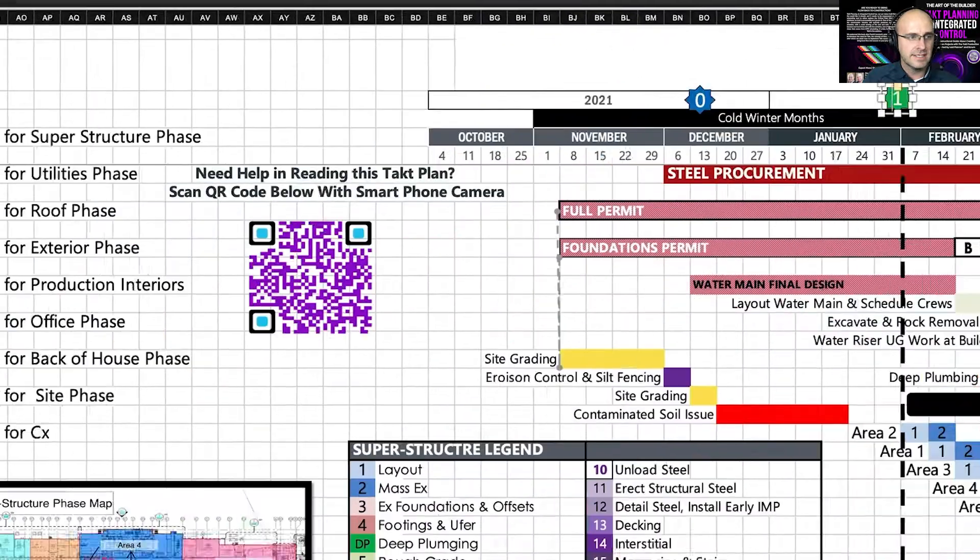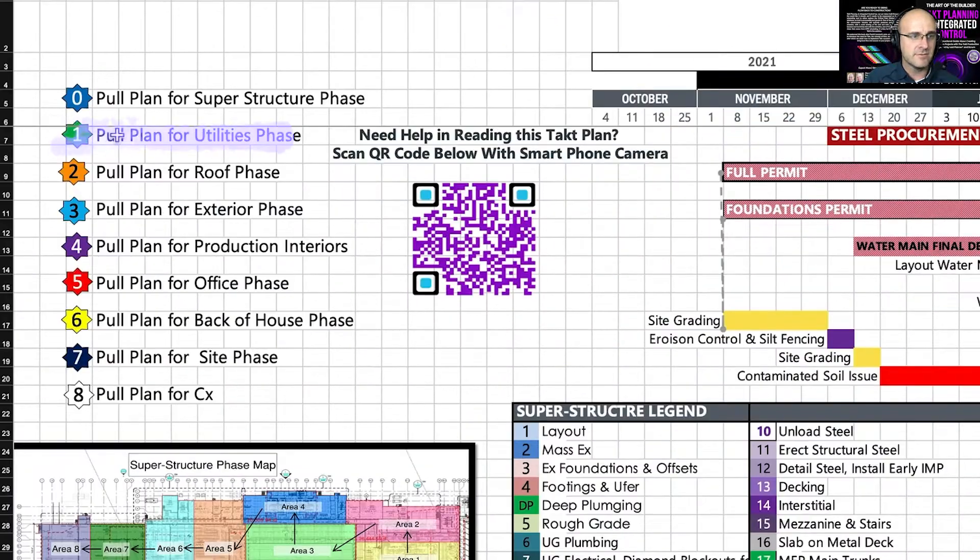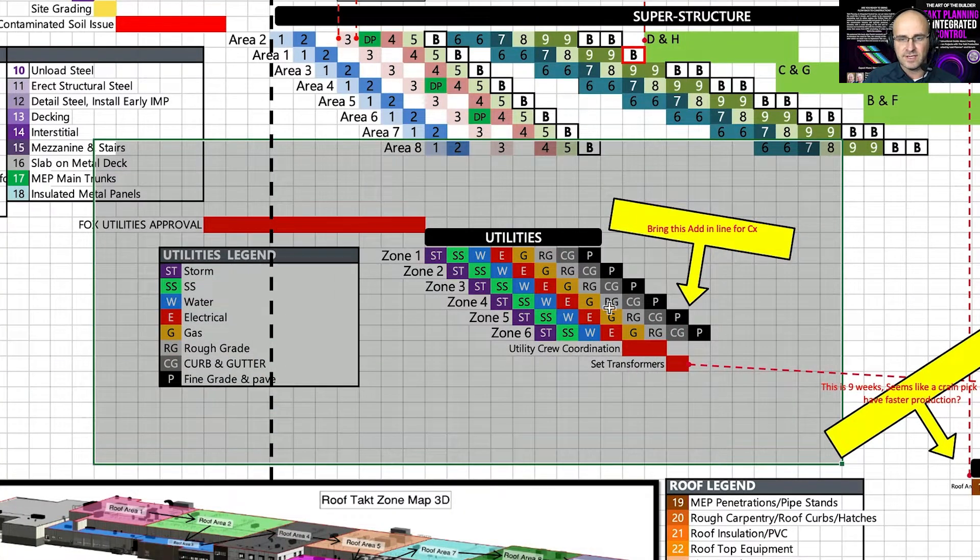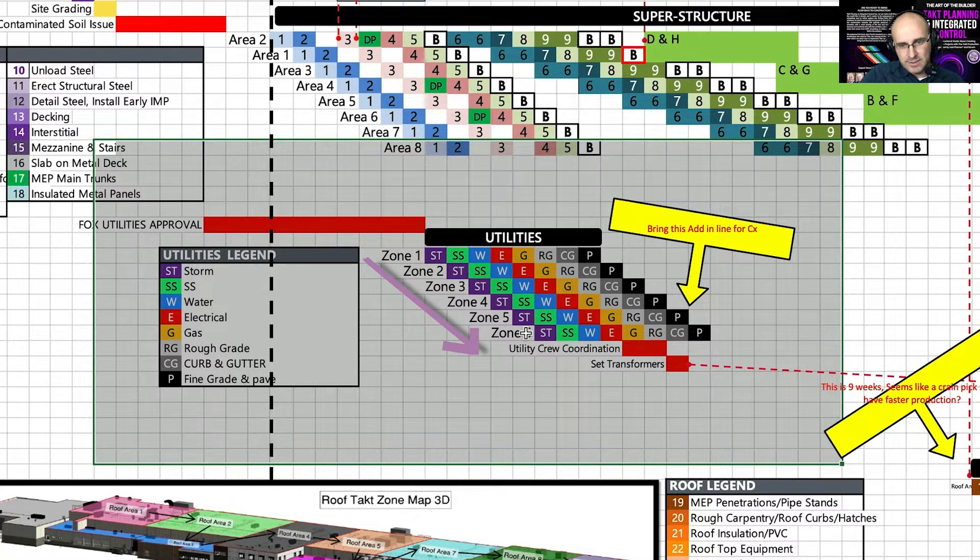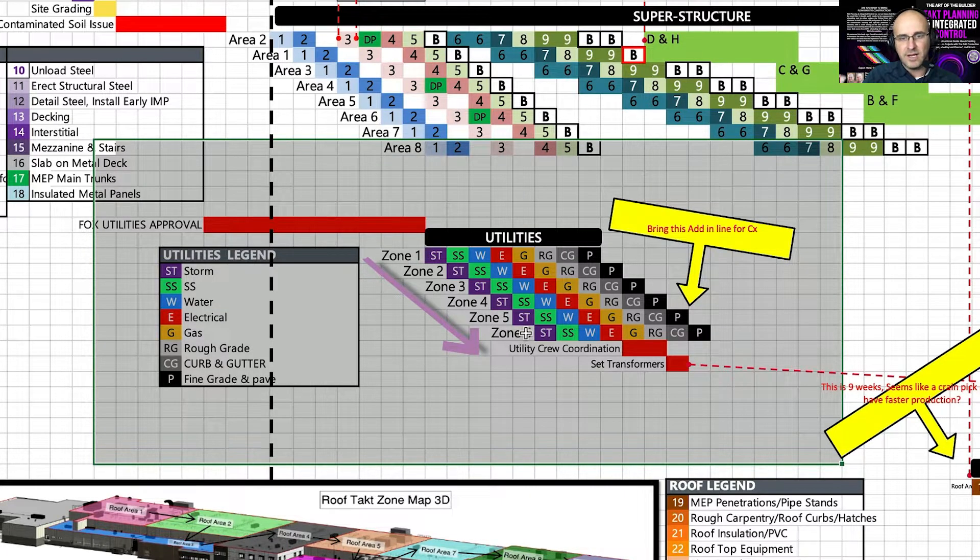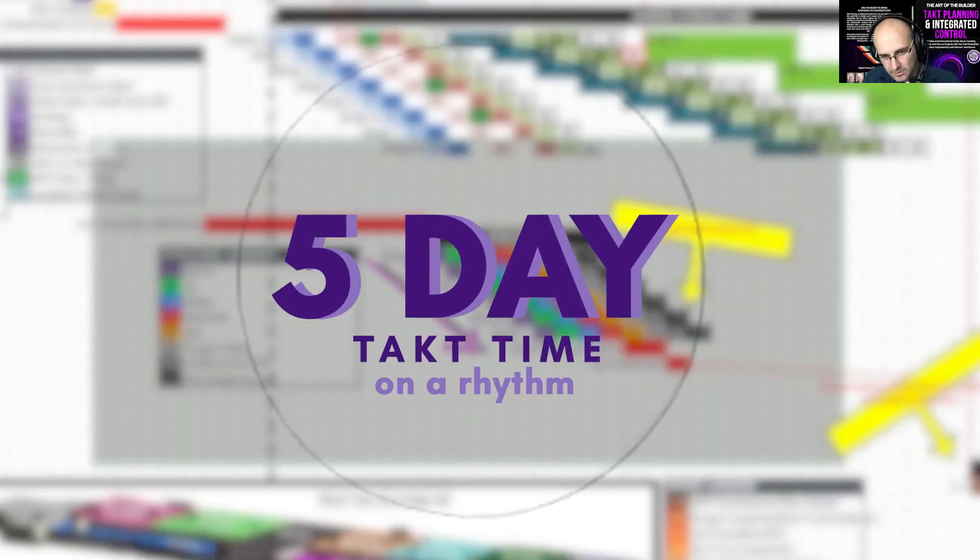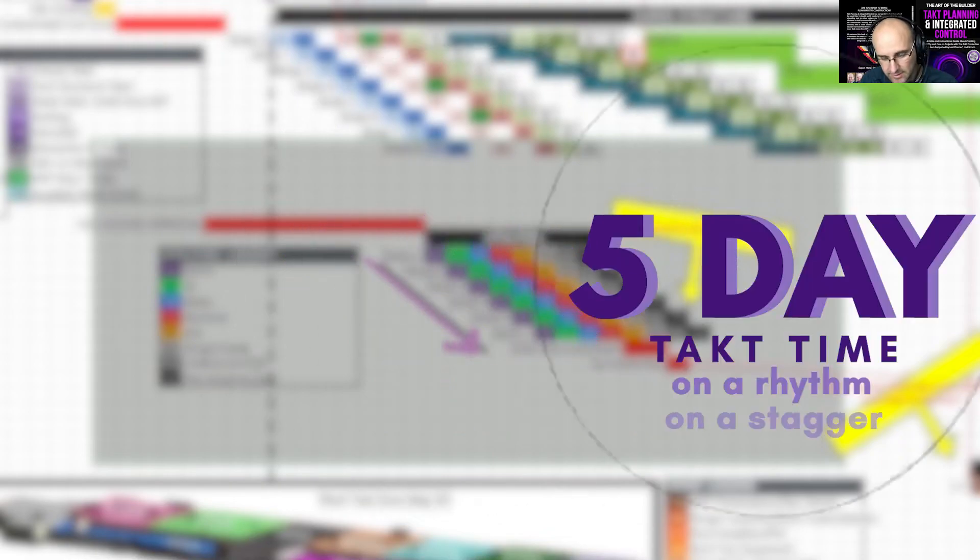Let's look at the one. It says pull plan for utilities phase. Down here, you can see the utilities phase where from zone one to zone six, the sequences are in there at a five day tack time on a rhythm, on a stagger.